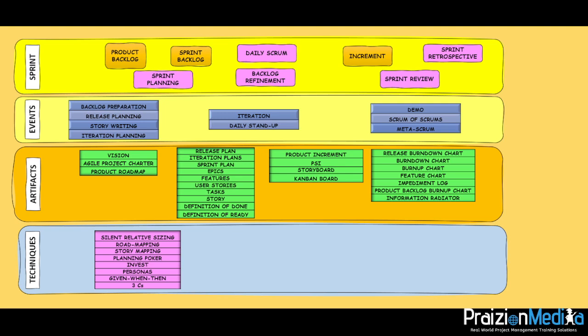One of the hallmarks of the story map, when it is well done, is the layers. The layers just represent releases, but the higher levels of layers show you functionalities in the form of actions that need to be carried out. So if that action needs to be carried out, there's certain functionality that has to be built, and those are lower levels. So the actions are the higher levels of the task that the individual needs to carry out. The lower levels are going to be the functions or the features that need to be built, and we group those by release.